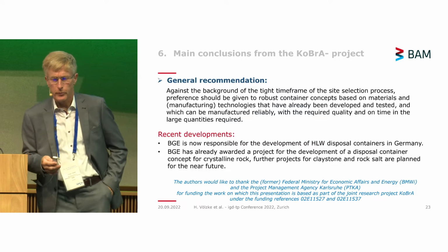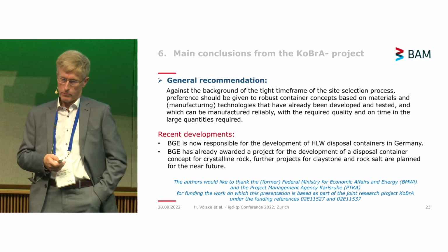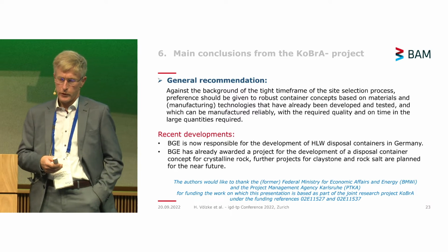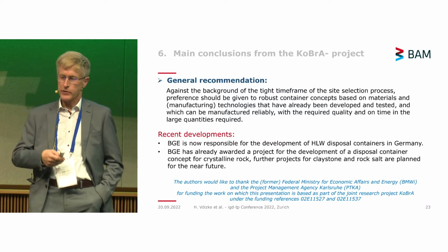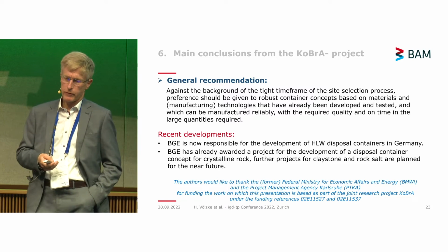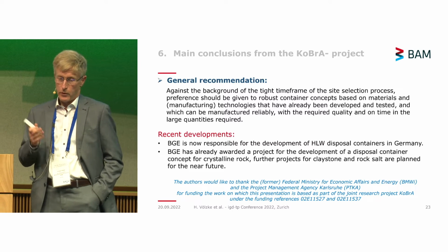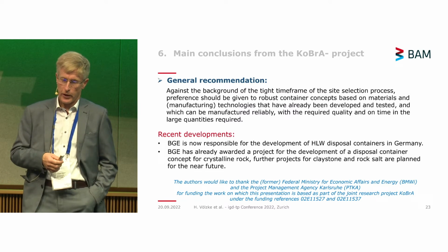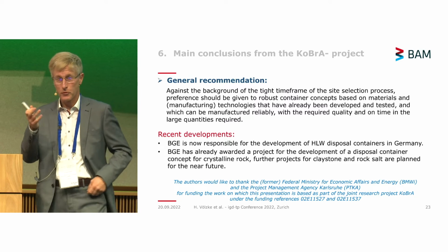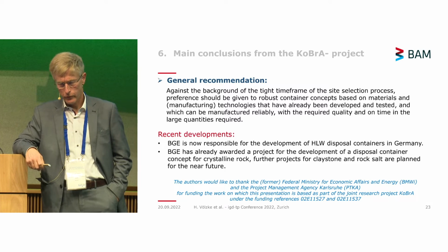And our general recommendation we ended up with in the project was that, against the background of the time frame and the site selection process, preference should be given to robust container concepts based on materials and manufacturing technologies that have already been developed and tested, and which can be manufactured reliably with the required quality and on time in the large quantities required. So this makes the loop complete somehow to what we were listening to before.